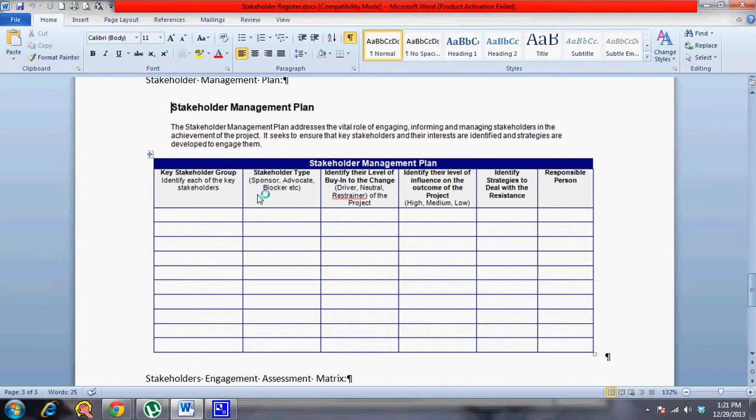I would rather write a stakeholder management plan wherein you have identified the different groups, you have documented that, then you write strategies for the different groups, and also a communication plan for the different groups. What if changes happen, how will you follow? So these would be my sections within my stakeholder management plan, in line with what PMBOK says.